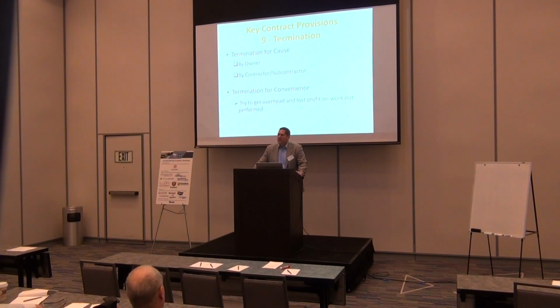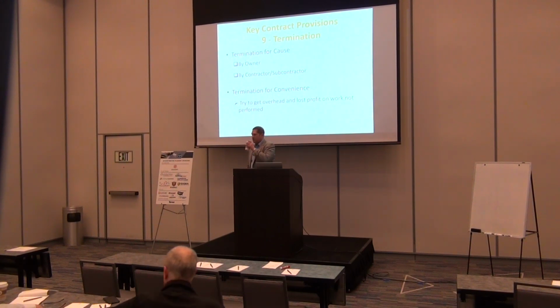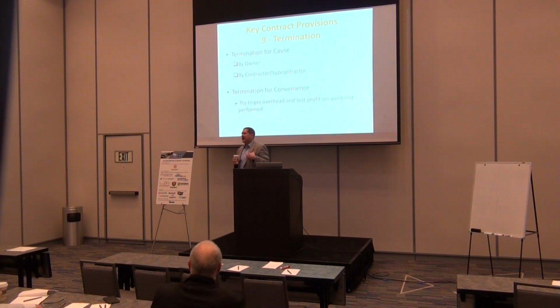Is that still termination for convenience? And is that, you're saying it doesn't withhold, if that's written in? My experience is that the cases have upheld termination for convenience for any reason. Okay, just as long as it says that? Correct. There are some cases that talk about having to have good faith and all that, but they're hard to win. Most judges are going to say, look, if there's a clause that says I can terminate you for any reason, then I can do it. And so they can do that.